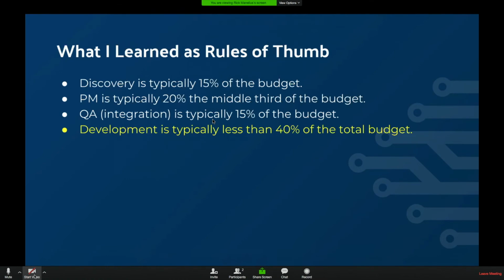You did your due diligence, you had multiple people review, you had the client review, et cetera. I find that integration QA at the end of the project, making sure all features reconnect and things don't break, typically was 50% of the budget. If you're very disciplined, that might be down to 5 or 10. If you're not and moving very rapidly, that may be 20. And that could be a hard pill to swallow for a client to see that as a line item. But if you're truthful to yourself and them, that's just a reality.